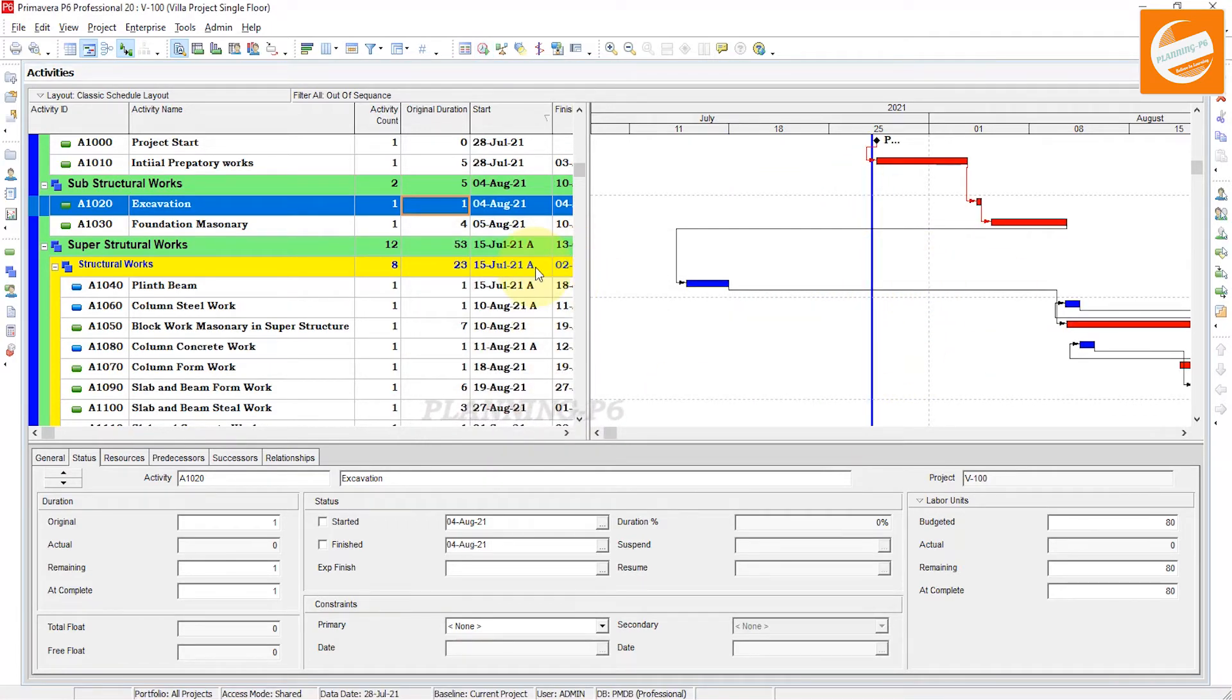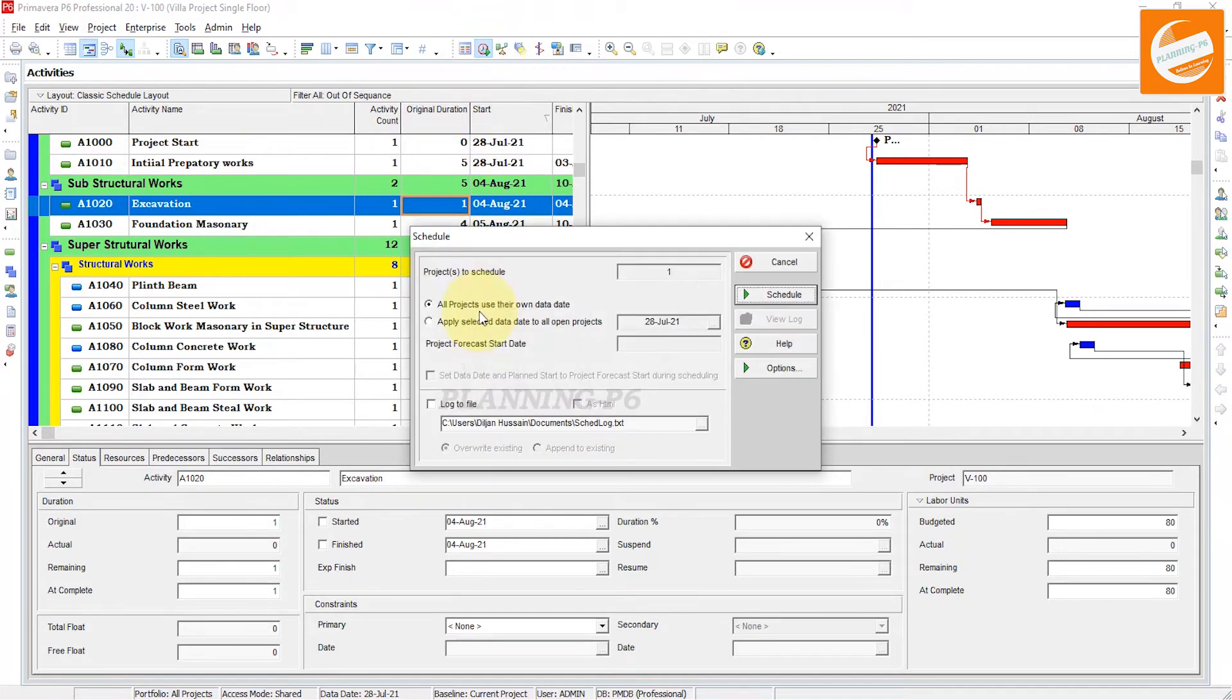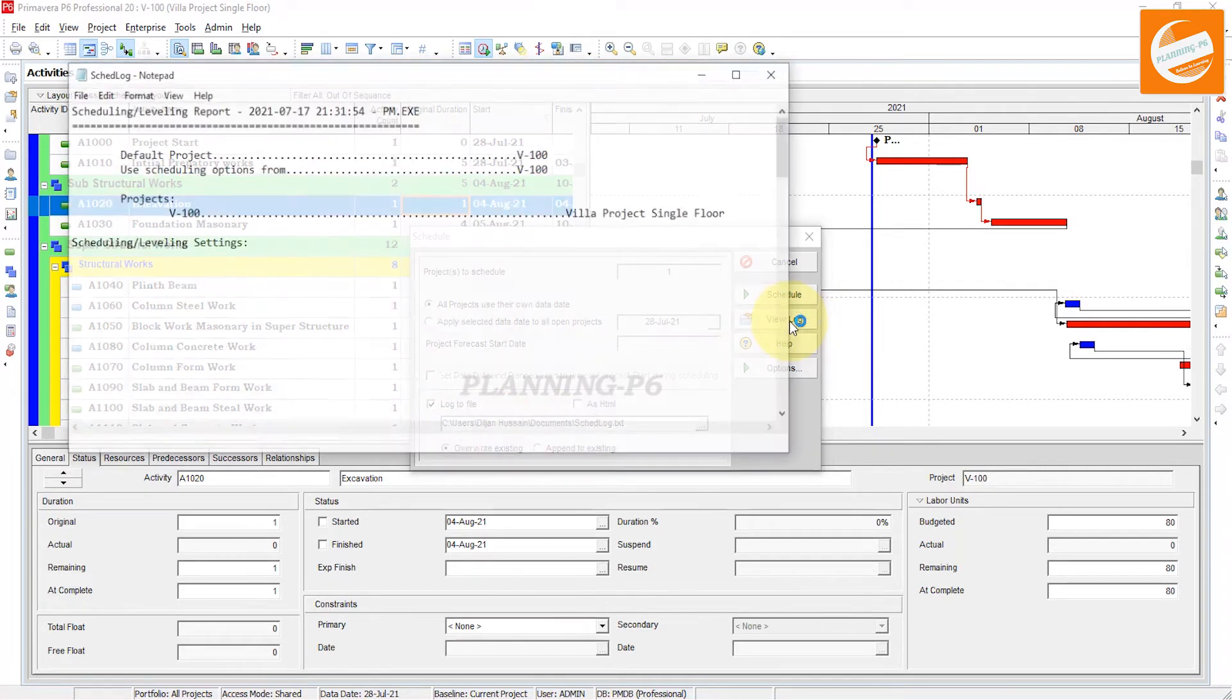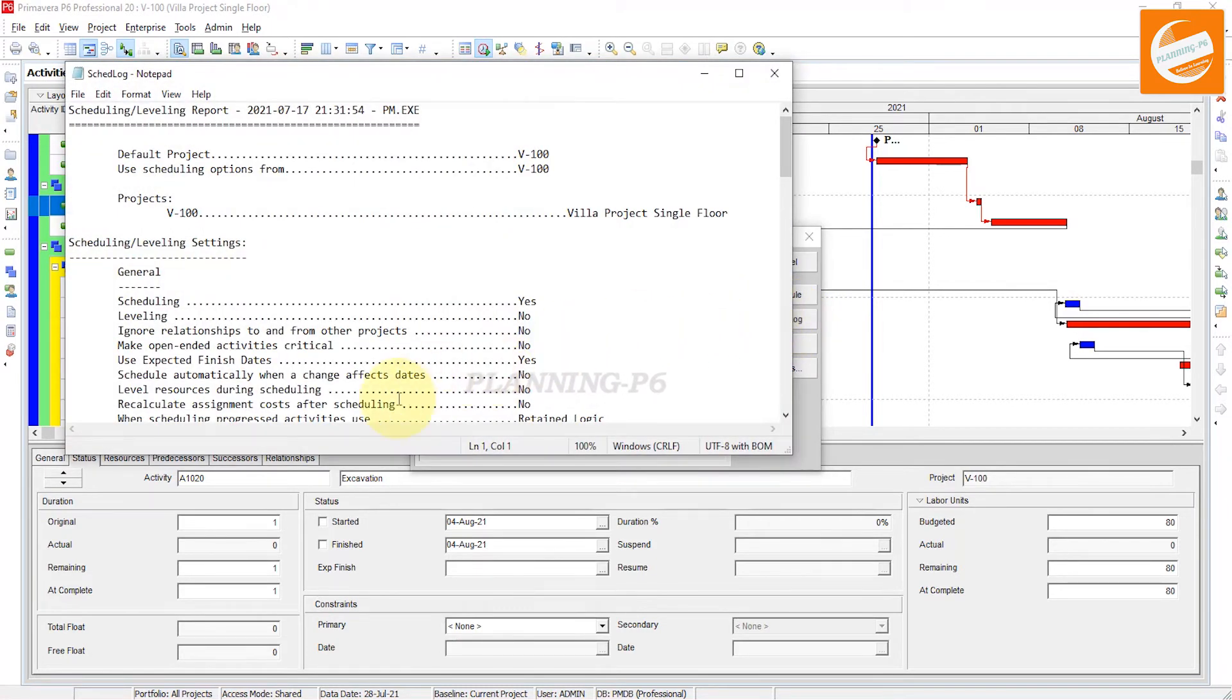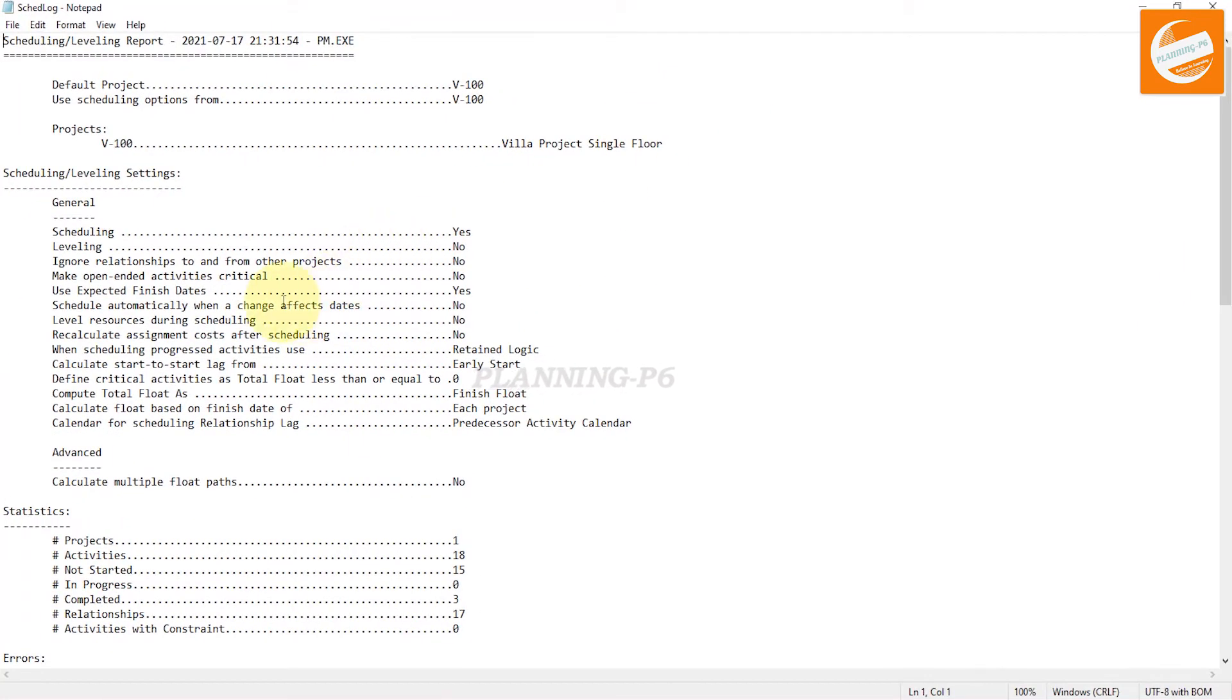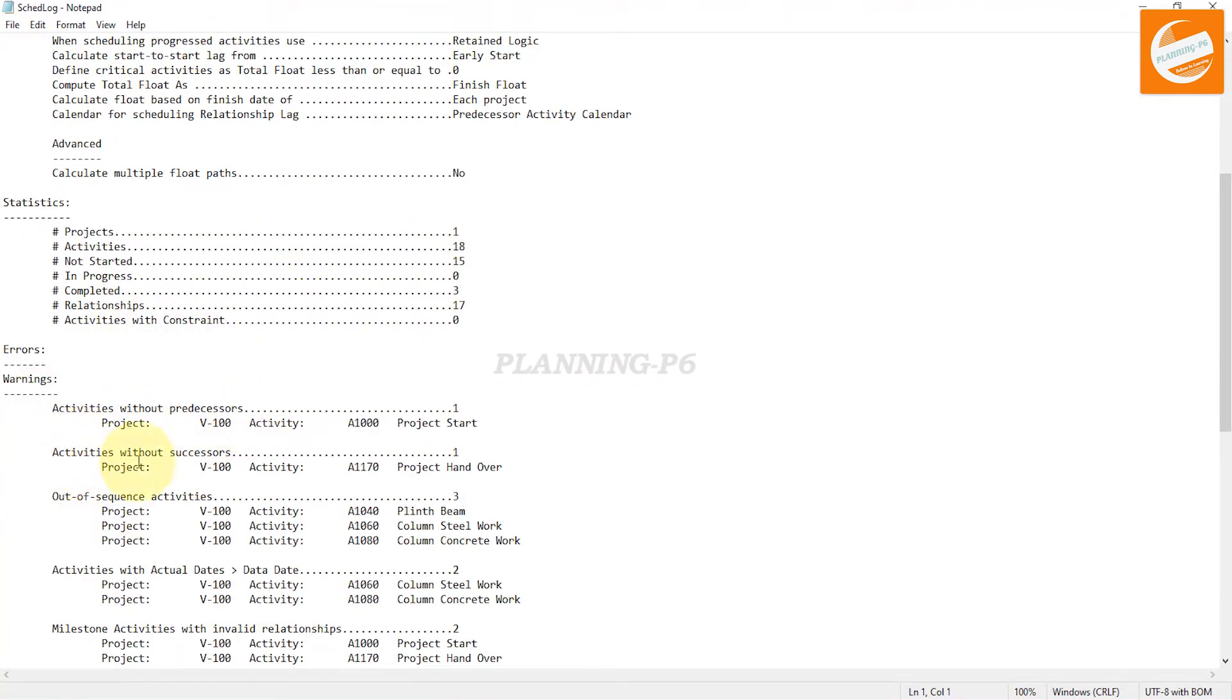After scheduling, go again to that tab and see the log file. View log, maximize it. In the errors section you can see activities without predecessors, activities without successors, and out-of-sequence activities. These three activities are out of sequence.